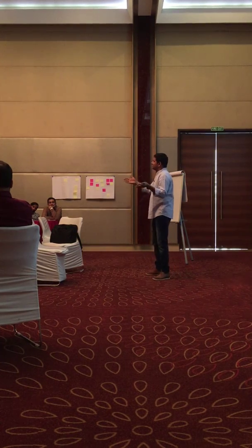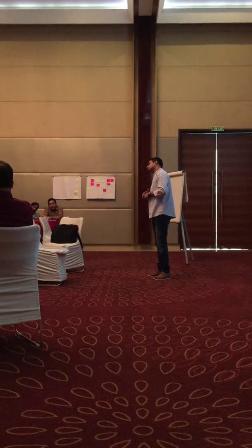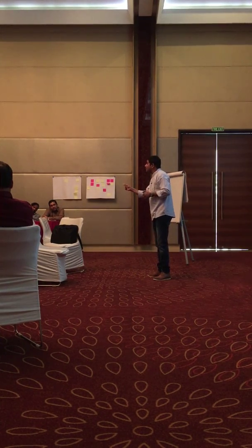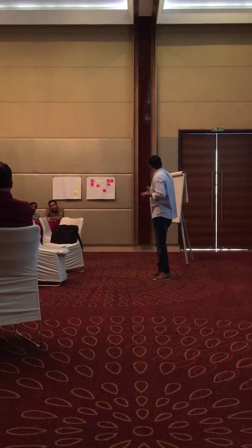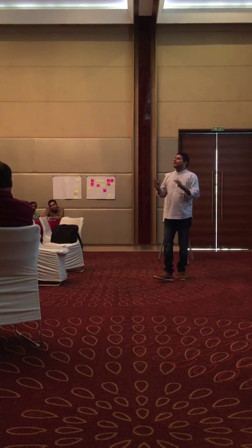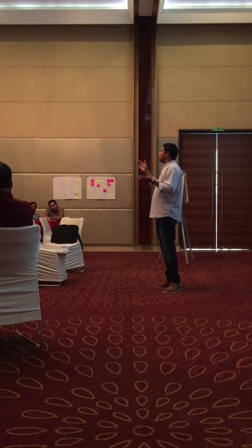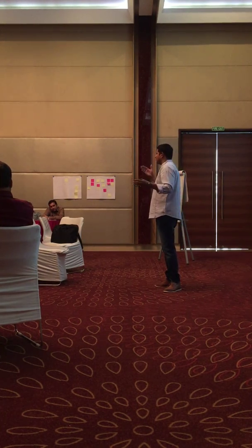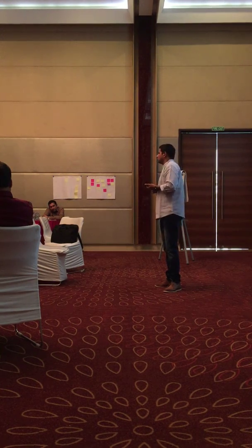If your release is 3 months, correct. If you can do it, then you have to keep some amount of time for these unmet definition of done items, like regression testing, stress testing, and all. Some teams call it a hardening sprint. The last sprint is a hardening sprint where we don't develop any new features, but Scrum expects you to deliver a potentially shippable increment every sprint. So it is up to you to handle whether in every sprint I do some automation and complete the regression, or in the last sprint I do it, up to you. But it is not a good way of doing it.